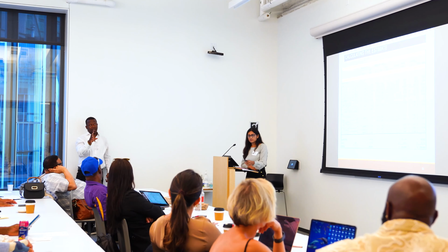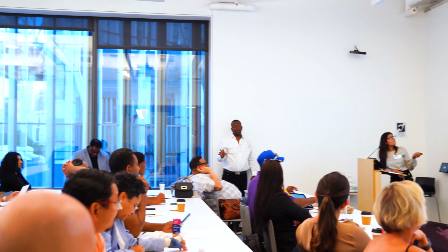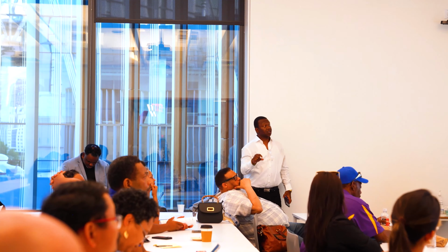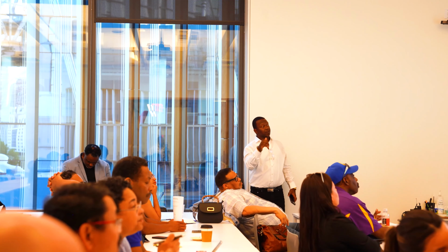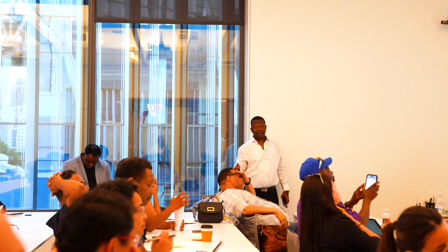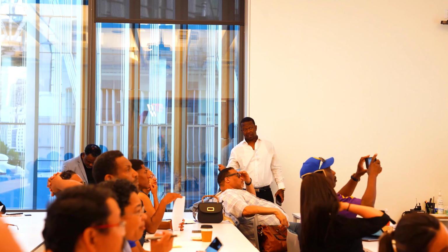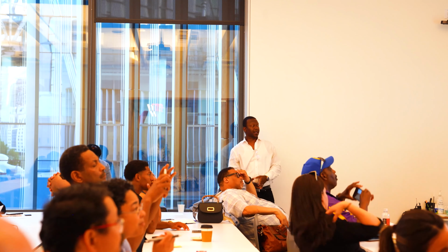The New York State Department of Labor has prevailing rates: there are state labor rates and then there are city labor rates. That gives you a breakdown, and there it is right there, of the rates you should pay for supplemental benefits, so insurance and vacation time.